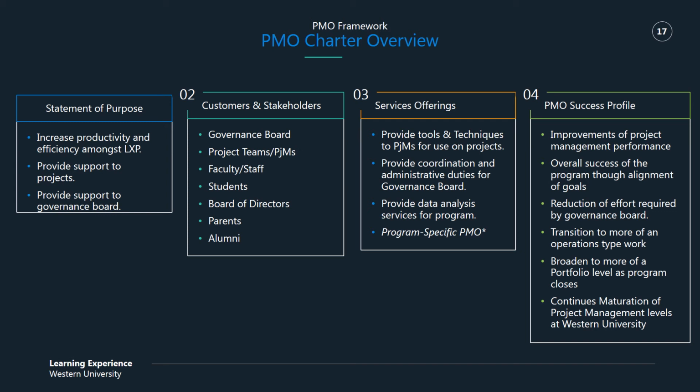Service offerings are to provide tools and techniques to project managers for use on projects, provide coordination and administration duties for the governance board, and provide data analysis services for the program. This is essentially what the PMI standard would define as a program-specific PMO.